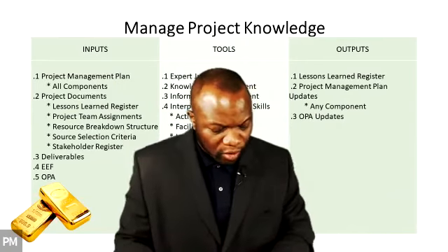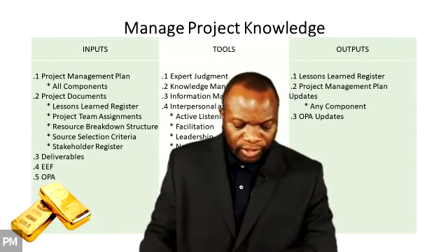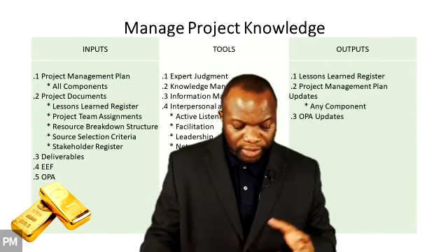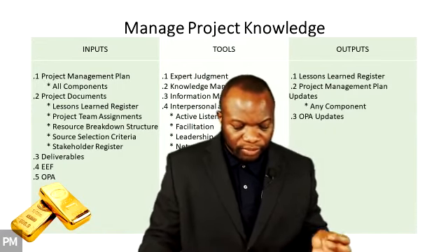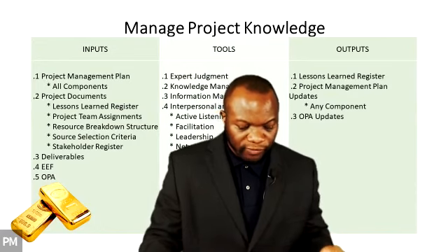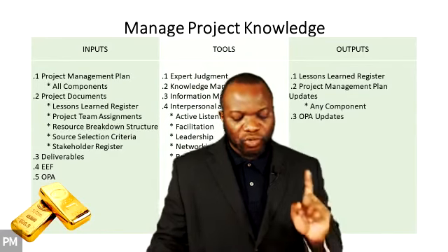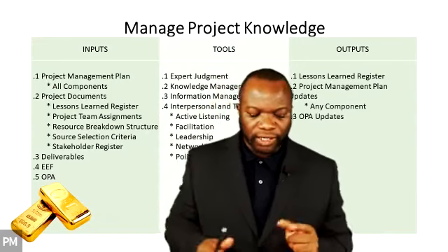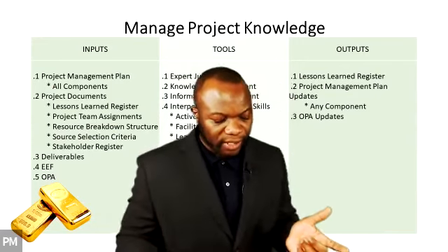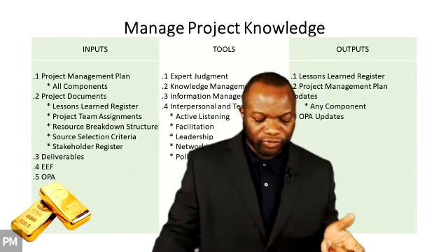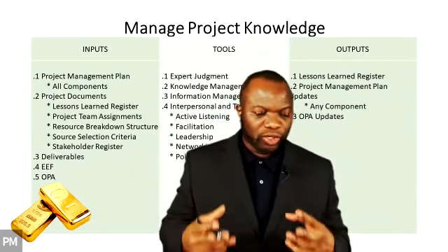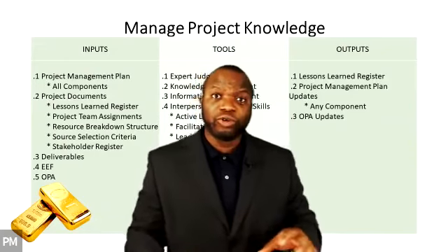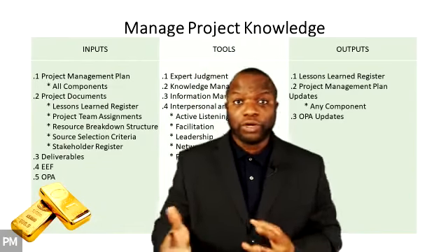Look, it says, all projects create new knowledge. Some of this knowledge is codified, embedded in deliverables, or embedded in improvements to processes and procedures. Existing knowledge can also be codified or embedded for the first time as a result of this process. Watch this. If an existing idea for a new procedure is piloted in the project and found to be successful, what is it? It will eventually become an OPA if a process is found to be good by virtue of the lessons learned process, the manage project knowledge process.